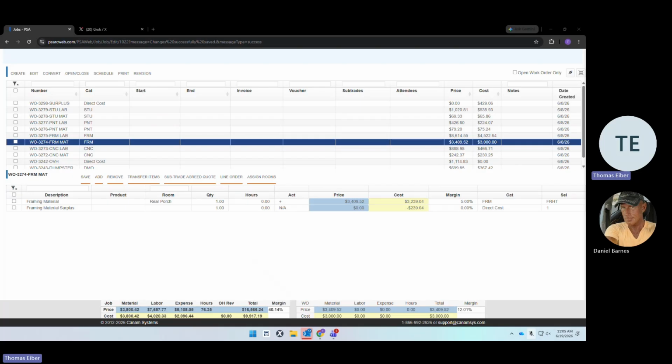When a work order is created, when they're given to you, resources are already allocated into them. So in order to really be able to spend them, to use these work orders, we need to voucher them, in order for you to pay a subcontractor, or to purchase materials from one of our vendors, Home Depot, Lowe's, Handyman's Haven, any vendor, you need to have a voucher.